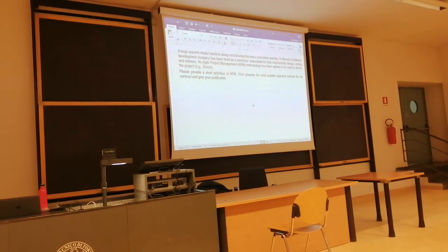There's cost plus incentive fee systems. All costs are reimbursed for the hours spent, and then the more you deliver in a short time, the more profit you get, which is a good incentive to maximize the value of Agile Project Management. So to me, the best solution would have been a cost plus incentive fee. Human resources costs for all sprints will be reimbursed, but the profit will be according to how many of the requirements will be delivered. The more requirements are delivered, the more profit you get, basically. Right?